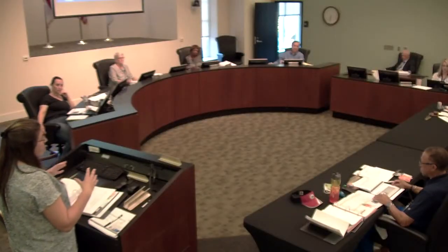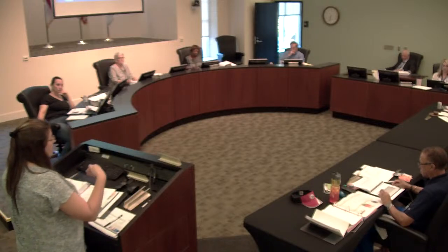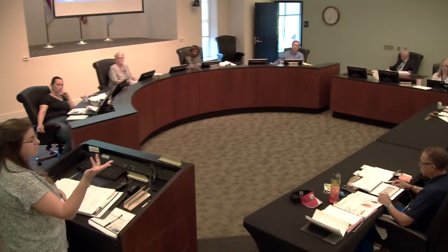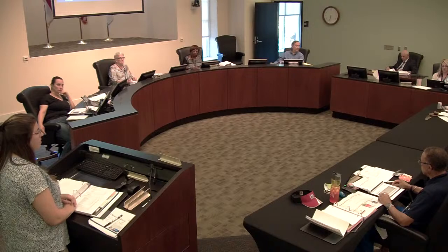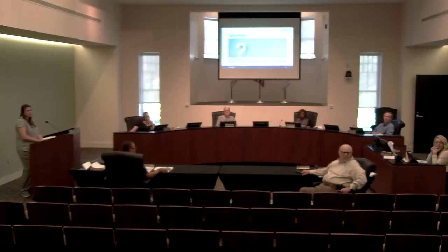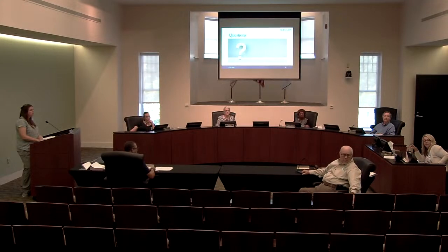So do you have to have that if you paint crosswalks, or do you have to have it if you stamp crosswalks? It's my understanding, Chris, you could help me out, that if we're doing anything within the encroachment area of NCDOT's road, we're going to have to have engineered drawings. And Chris has nodded that we would have to have that. For any type of just painting, that just seems excessive. We have to get an encroachment agreement. If we just stripe it, there's a chance they might take an encroachment agreement, but for any type of construction.